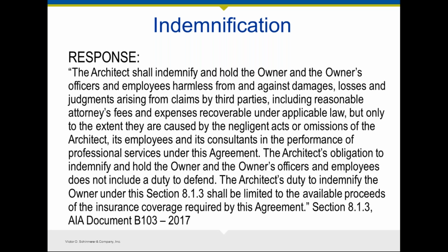Similarly, the AIA documents had a similar clause, not in the B101, but in the B103. And interestingly, the AIA has decided to couple this with a limitation of liability clause that limits the indemnity obligation to available proceeds of the insurance coverage required by this agreement. Your client may well balk at agreeing to limiting your liability, but it's certainly worth an effort for some claims.